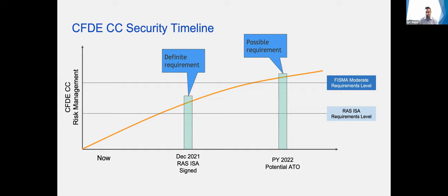This is a couple of other things; you see the two callouts, those are the annotations. So we weren't starting from scratch, but this diagram, this kind of ramp up diagram, I think is very relevant for a lot of projects when they're approaching security. Because if you haven't gone through an ATO process, I assure you, it is a ton of work. It can involve a lot of people, and it can involve a lot of money, where you start with an order of $1 million and go down a little or up a little, depending on your capabilities, et cetera.